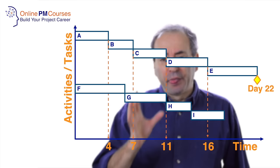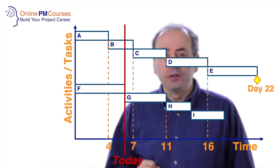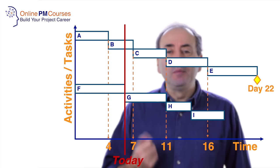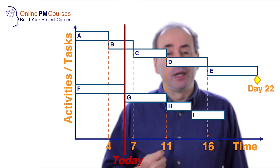So that's your basic Gantt chart, and it's very easy to read. We can put a vertical line through the Gantt chart to indicate today, so that at any point in time during our project we can read off where we should be and then assess the level of completeness.